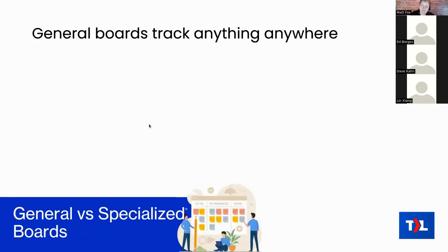Now let's talk about general versus specialized boards. A general board is what I've shown you throughout this course — typical columns like new, ready, waiting, in progress, and complete. Those stages can work for just about any workflow at any MSP; they're very generic. That's not the only way to track work though. There are also specialized boards, which track work for one specific workflow.